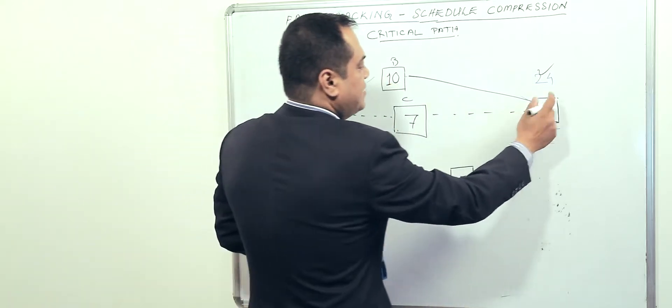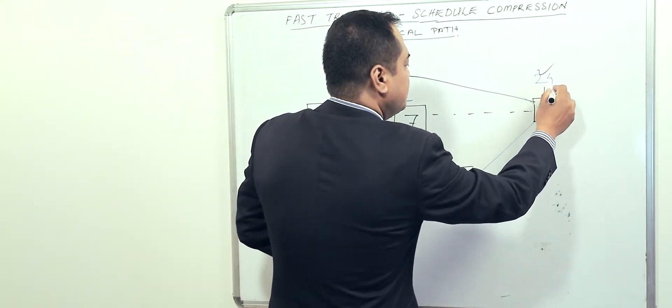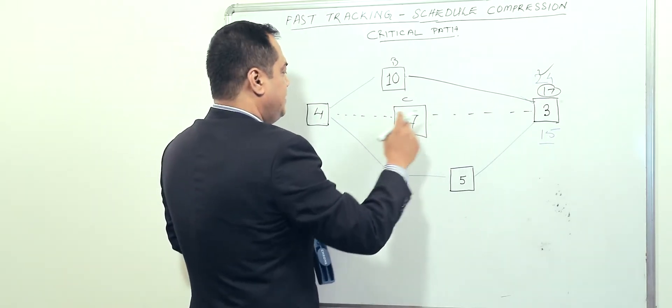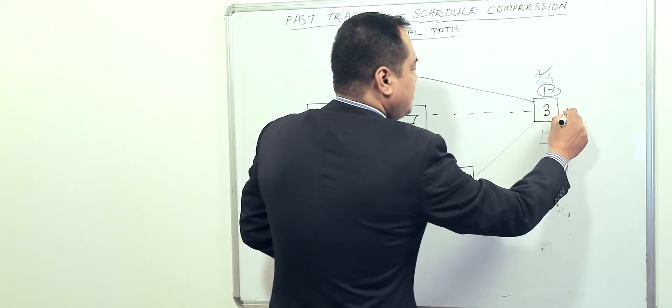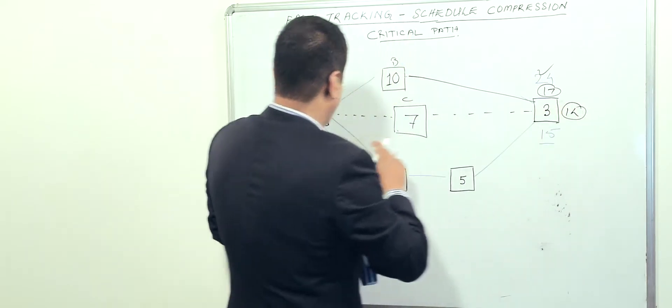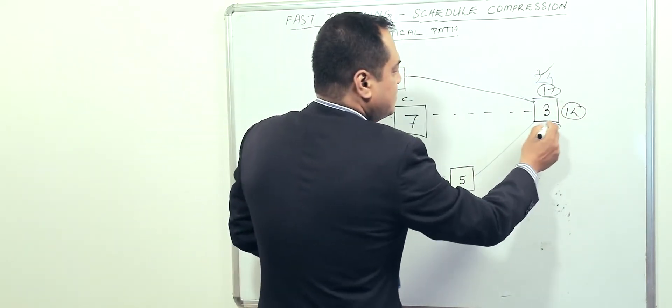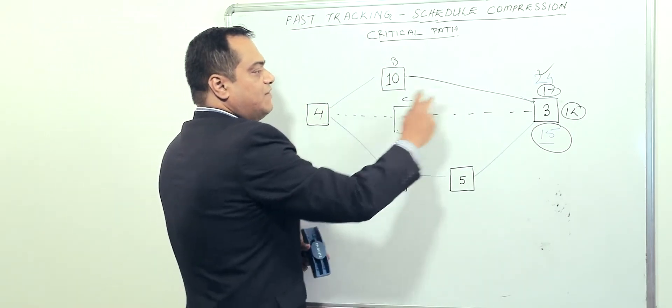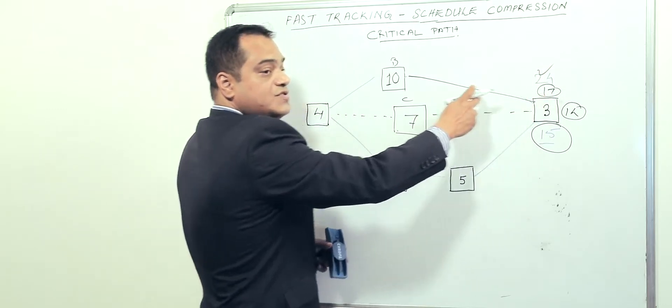It will be four, ten, and fourteen and three - that's going to be seventeen. We have four, seven, and three - that's ten. This is going to be fourteen, and this one remains as fifteen.